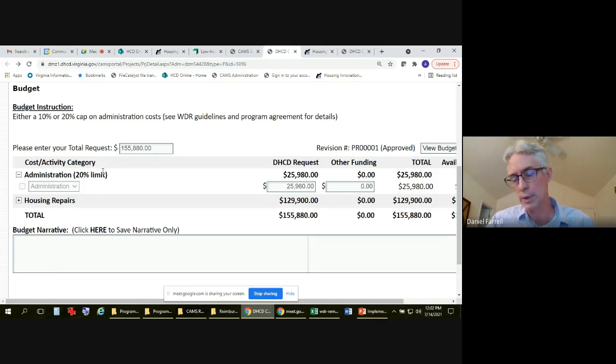But generally, we want to know what the project budget is. So if both roofing and electrical repairs are needed to get the home off of deferrals, we'd like to get those on one project and approved and billed on the same project. I hope that's helpful. If you want to jump on the line, if we're missing something there.